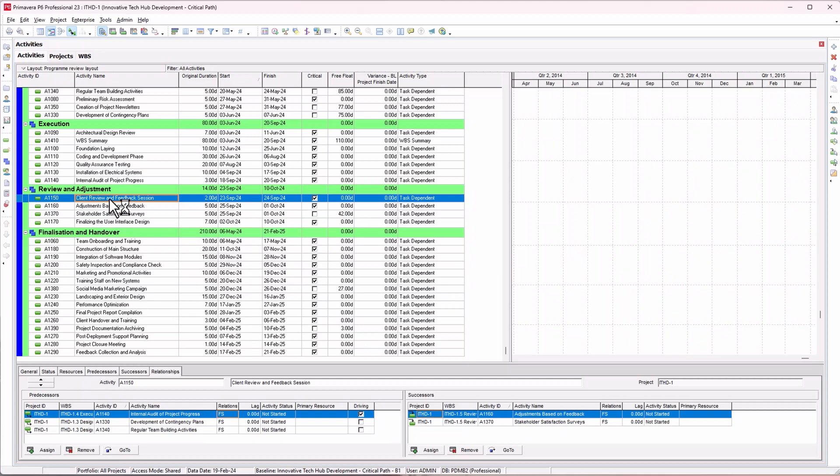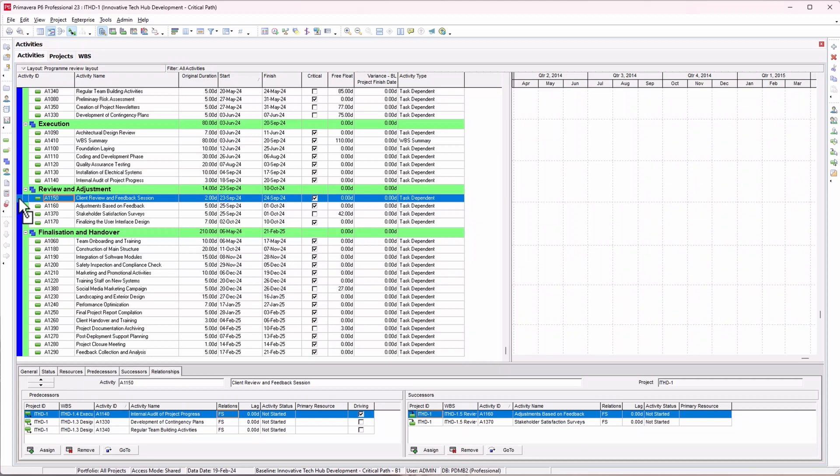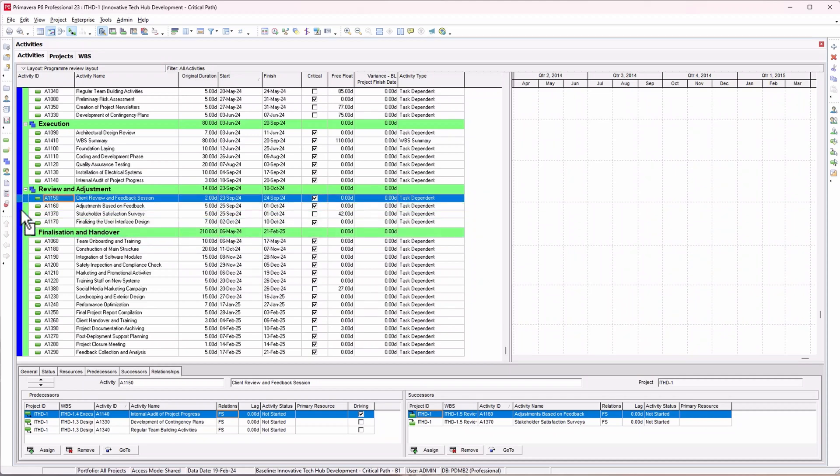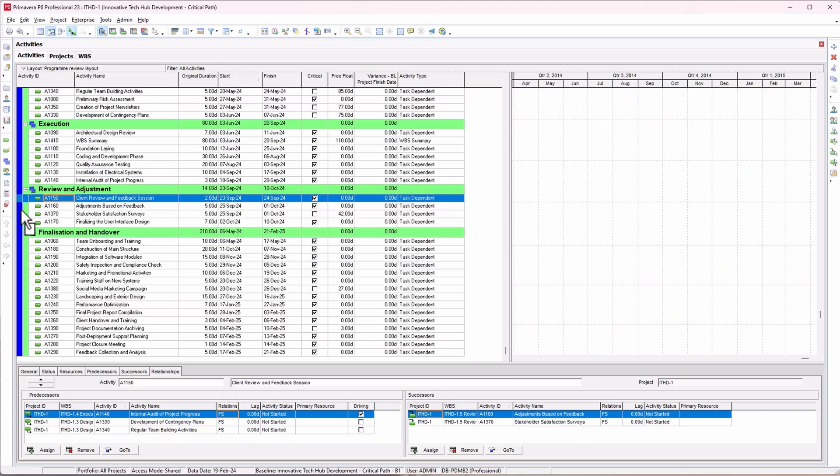Let's say that's not what I want, or I want to use another technique. This is a bit tricky so just follow. When you click on the activity you need to move, move to the left-hand side of this band. You'll see there's a rectangle underneath your cursor. Left-click your mouse and drag the activity to where you want it to go. When you click on the activity, nothing is under your cursor, so move to the most left band, click and hold it down, and bring it back.